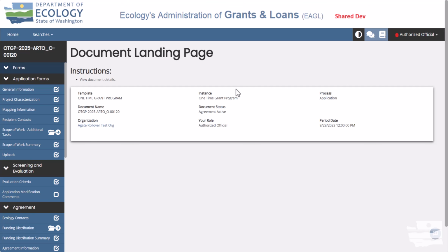There is no restriction on the number of PRPRs that may be associated with a parent document, but only one PRPR can be in process or under review at a time. This means that you cannot initiate a PRPR unless all other PRPRs for the parent document are in one of the following statuses: Payment Request, Progress Report Canceled, Payment Request, Progress Report Approved, or Payment Request, Progress Report Active.